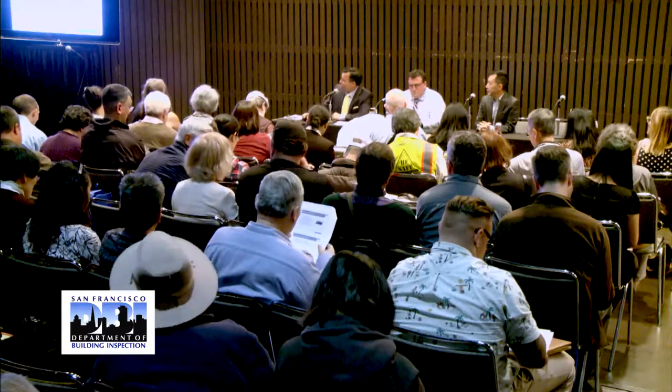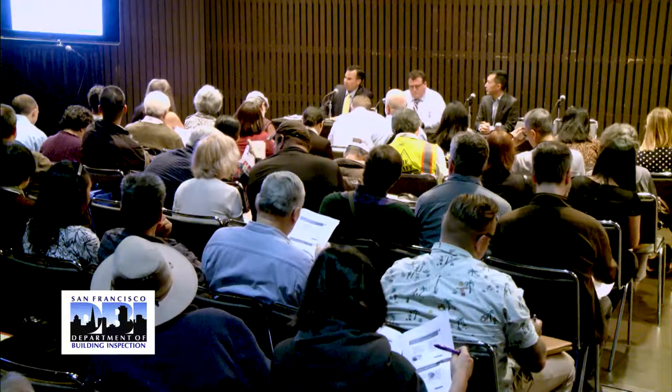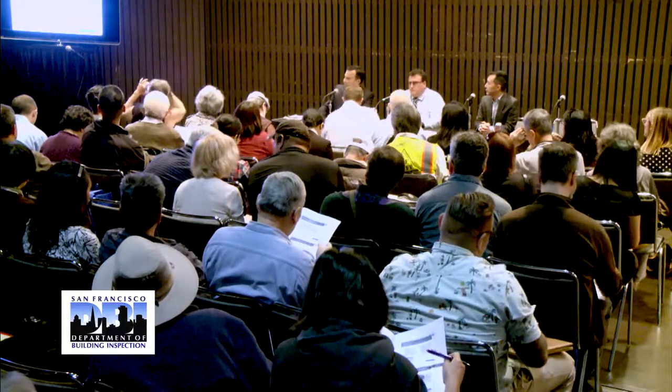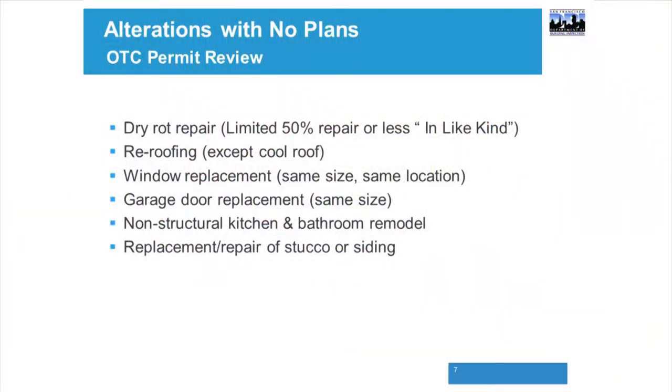All right, so alteration. So now here we are. You decided that you do need a permit because you don't fit into any of the exempt categories. And the following is for an OTC, which stands for over-the-counter permit review. That is, you come to the building department, you do not need plans, you just fill out an application, and you can get a permit for the following work without plans.